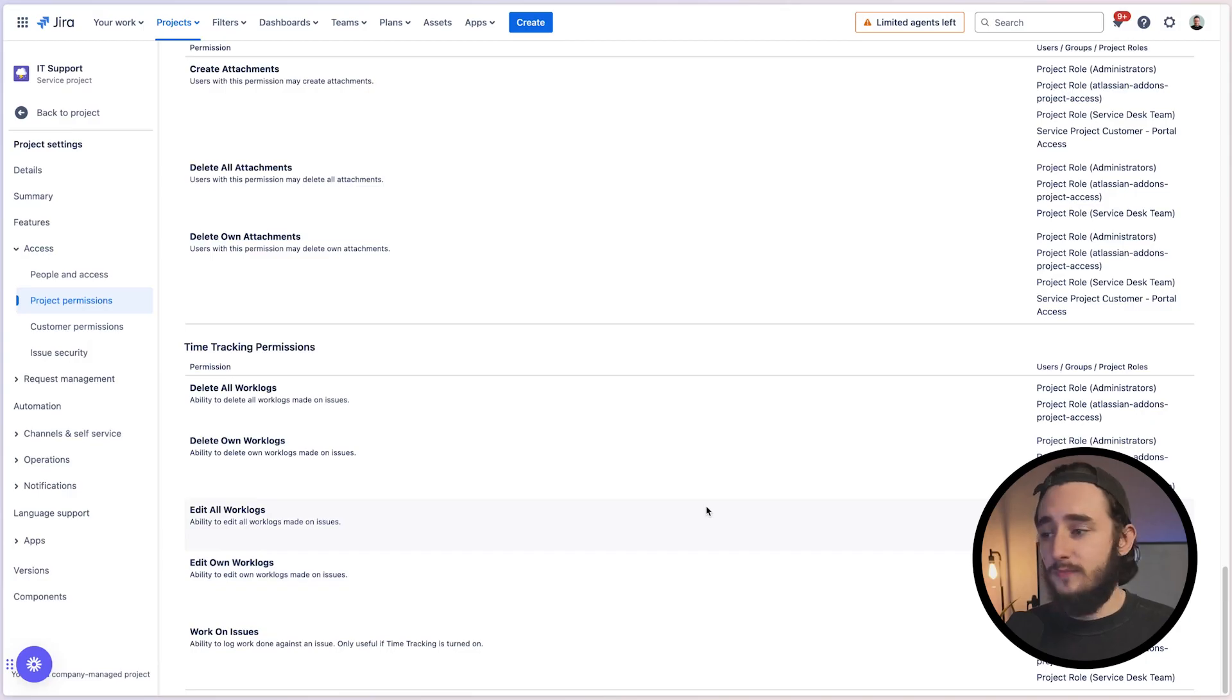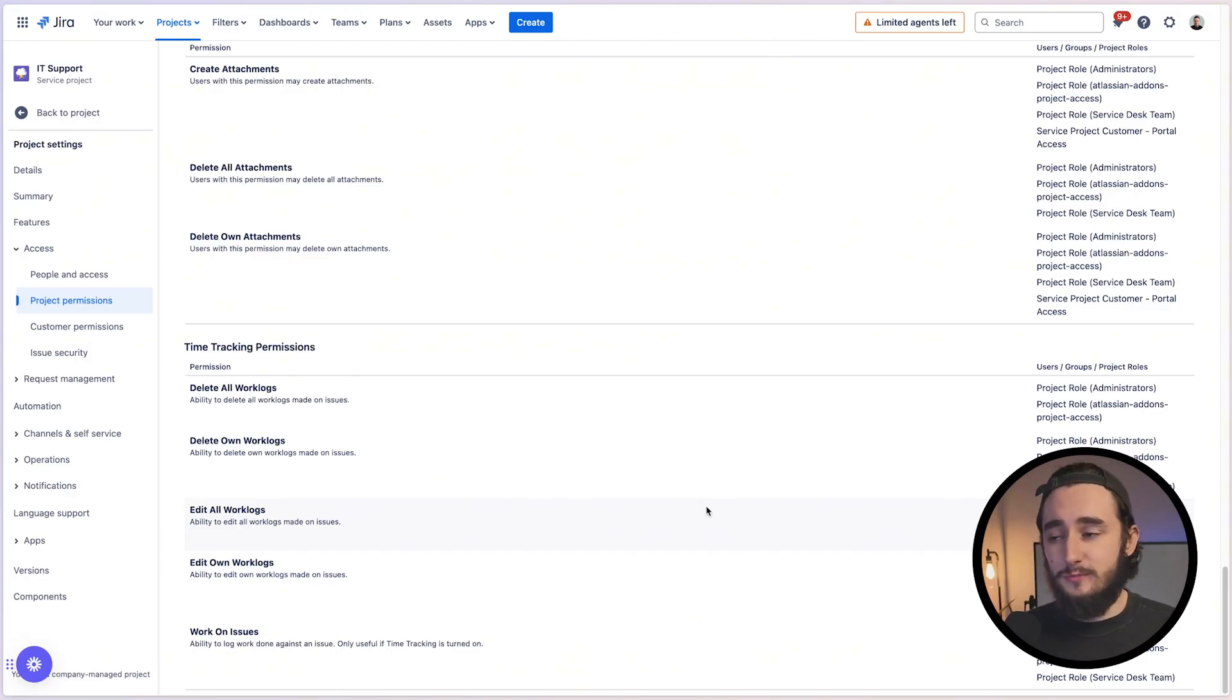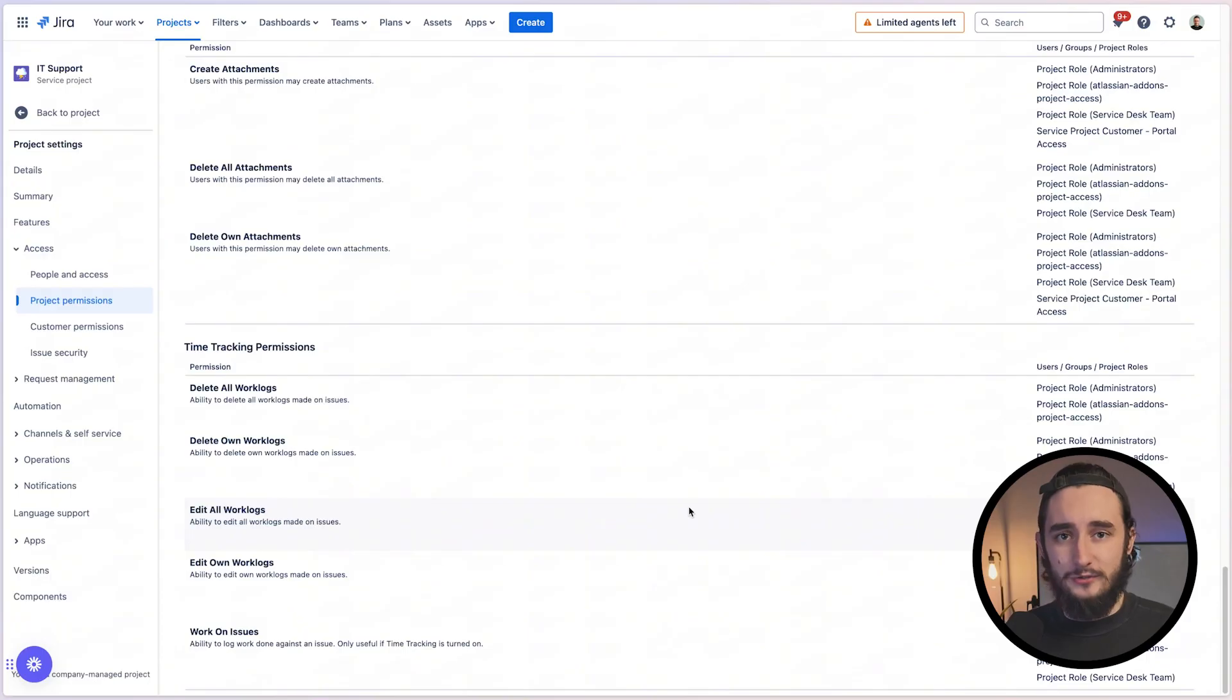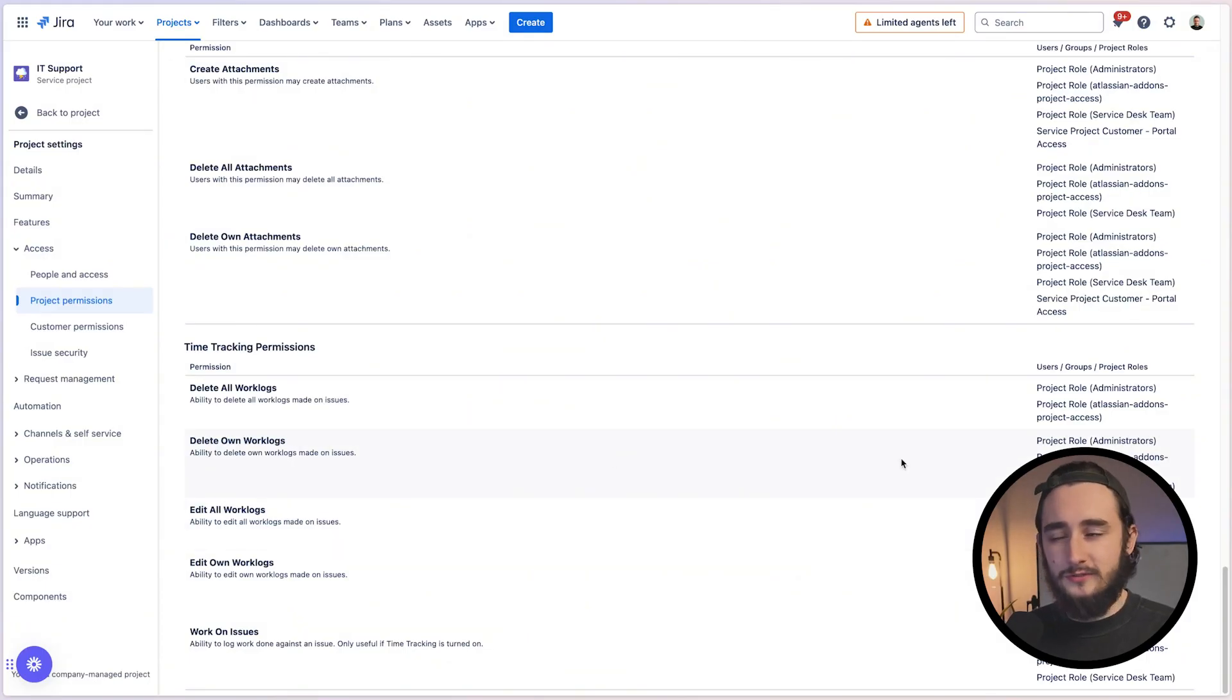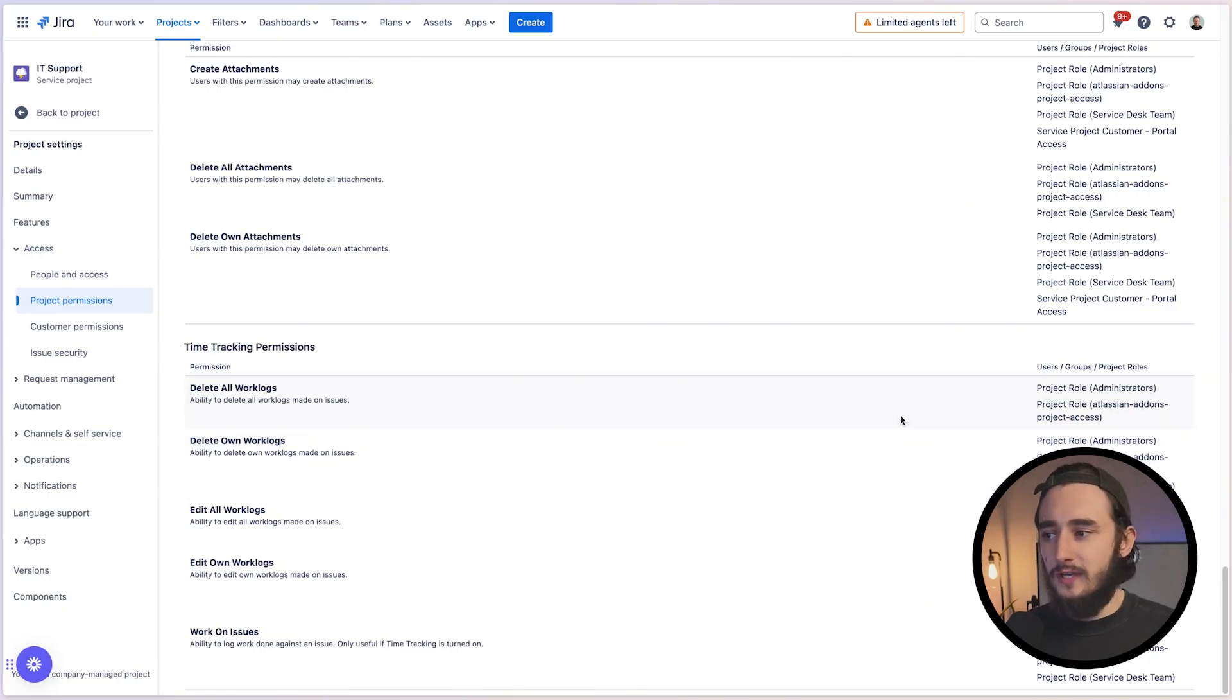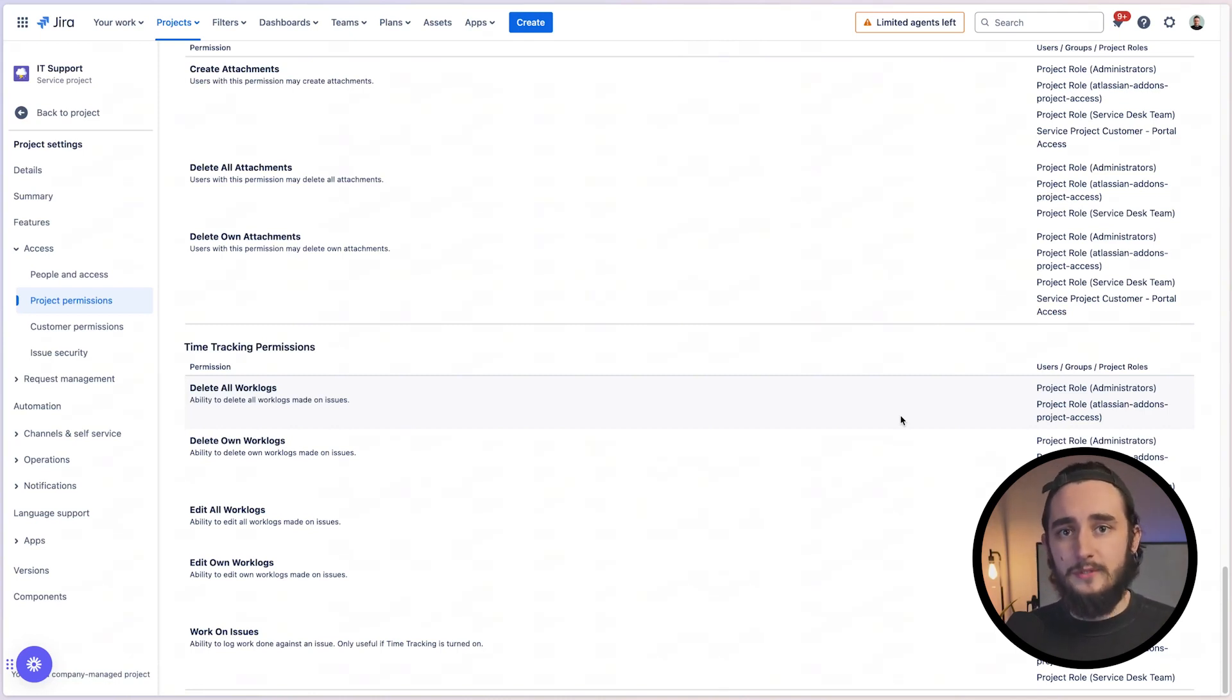Edit all work logs. This is one that I would restrict to only admins or maybe not even project admins, but just some super admins inside of the organization. Otherwise, you'll have people just jumping in and changing work logs on behalf of other users. Delete own work log. This is also one I recommend having for your users. That way they could delete work logs and recreate them if they ever need to. And then delete all work logs. Same thing as edit all work logs. I would tend to not allow this for everyone. Maybe the project admins or maybe even just global admins inside of the Jira environment.